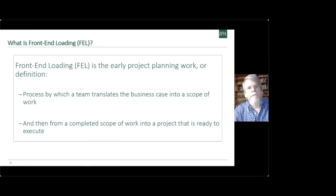So I needed to define front-end loading. And as it says on this slide, front-end loading is the early project planning work, or the project definition work. It is that early work when a project team is translating a business case or a business opportunity into an actual scope of work that can then be executed in design, procurement, and construction. And so that translation then is set up where we are completing the scope of work and the project is then ready to execute. So it's that front-end work of translating the business case into a scope and then preparing that scope for effective execution. And that's what we, in a large sense, refer to as front-end loading. And it's a lot of effort that goes on to this work phase and it's a critical part of projects.